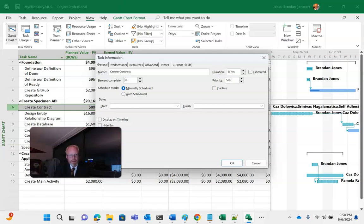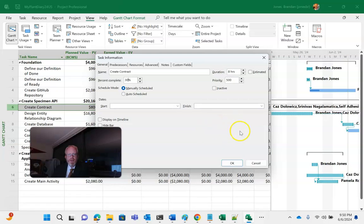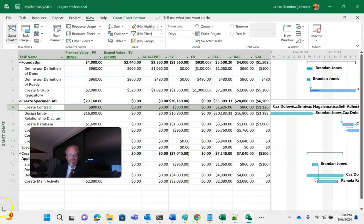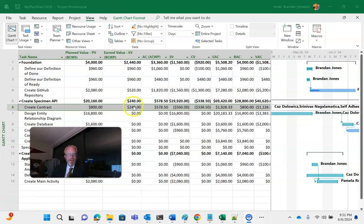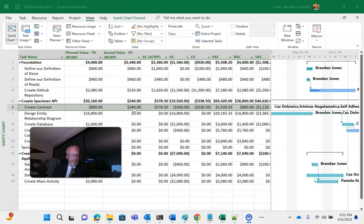You're not locked into that 25, 50, 75, 100% either. You could really put in any percent complete you want to. So I'm going to go ahead and say 30% complete. We said it was an eight-hour job. Boom. And once again, you'll see our earned value went up to $240, indicating 30% of that original $800 of value is complete, or $240. Actual cost of work perform is $578.50.